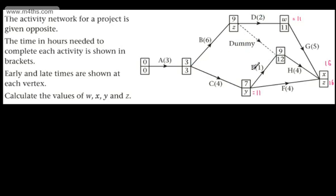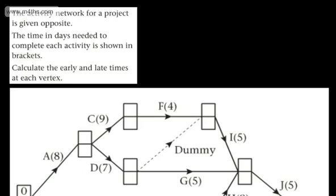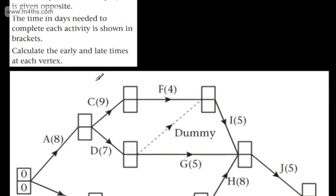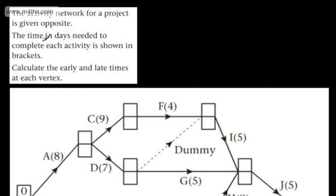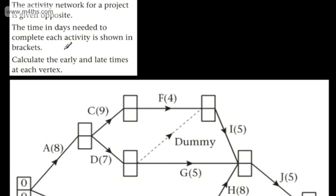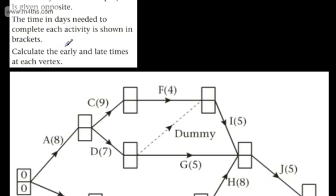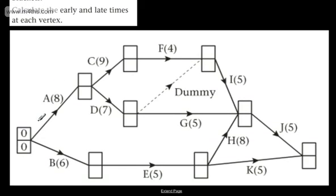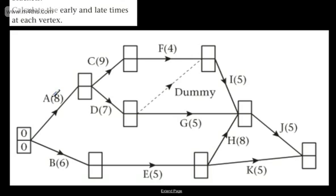Let's now look at another example. The activity network for a project is given, with the time in days needed to complete each activity shown in brackets. We need to calculate the early and late times at each vertex. With the source node, we're always going to have nought, nought — so we'll have nought, nought there.